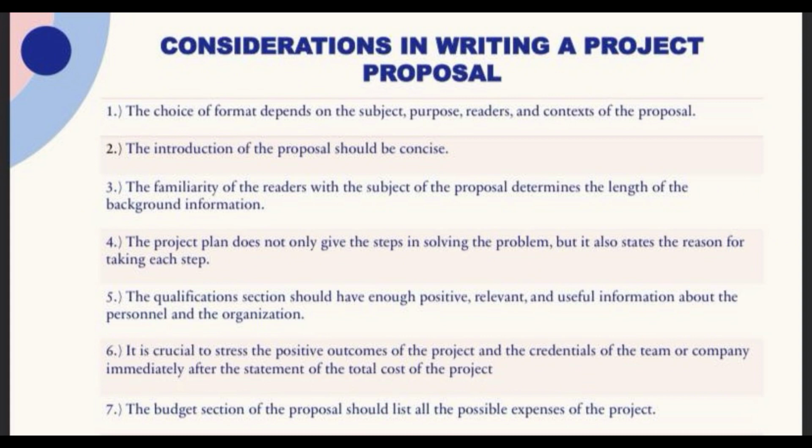Number six, it is crucial to stress the positive outcomes of the project and the credentials of the team or company immediately after the statement of the problem and the cost of the project. So after stating the total cost, immediately emphasize the positive outcomes and the team's credentials. This approach reassures the readers that the project will deliver value for the investment and that the team is capable of executing the project successfully.